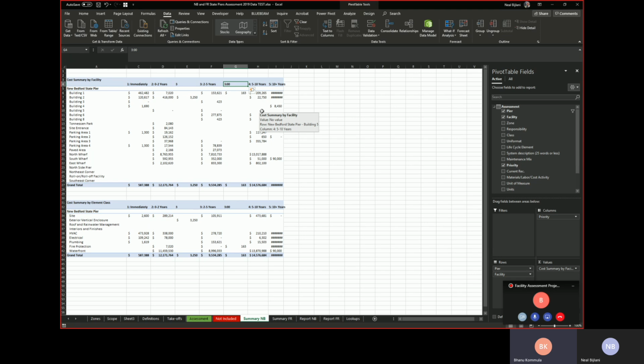And then somehow, if we can tie this up to a workflow where you can't do the client interview until the takeoffs are done, then that part cannot be done until somebody does the import of takeoffs, right? And you can't do the assessment until you do the client interview. Then that forces them to work in a linear fashion. Oh my God, that's incredible. Yeah, so you use the client interviews to actually do the prioritization. So we can set up some kind of mandatory prerequisite for every step. That way it forces your staff to follow the order, whatever order makes sense.